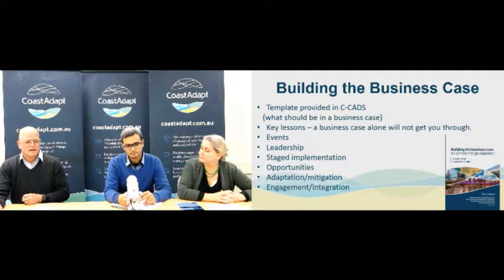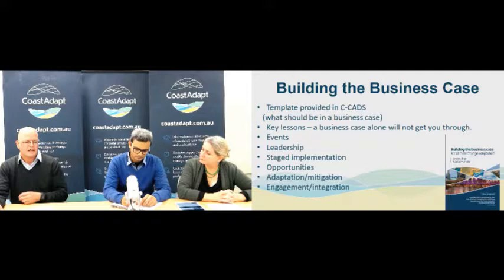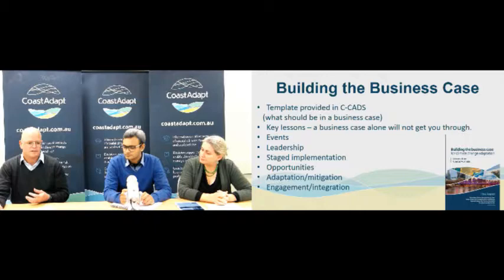Things such as business case alone won't work. You need to possibly have your business case ready once an event occurs. It's a really useful time because that will help focus your decision makers on what you're trying to achieve. Again, it requires leadership to get a business case through, and a business case which shows staged implementation of options is a very powerful thing because the people with the finances under their control will know that you're not trying to get them to spend money unnecessarily. And again, things such as looking for opportunities also help drive your business case forward.